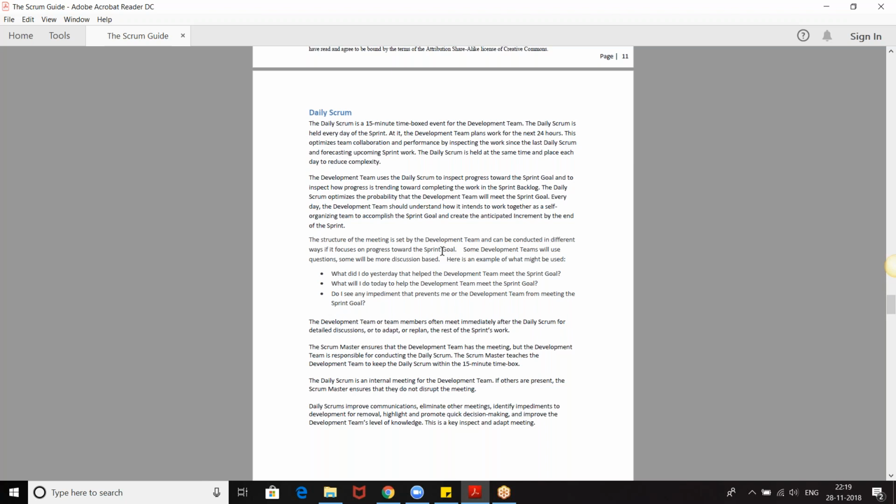So one thing, remember one thing, Scrum doesn't endorse predictability at all. Okay. For the simple reason that prediction most of the time is in a pattern, right? It is very predictive. Whereas forecast is something like you can forecast, but it is not necessary that it should go in a specific way. Like, for example, you can forecast your sprint work, but you can't be definitive that it will happen, because somebody can fall sick, somebody can go on leave. They could identify at last minute that they have some dependency with some other external team. So you can only forecast what is going to happen. You can't predict.